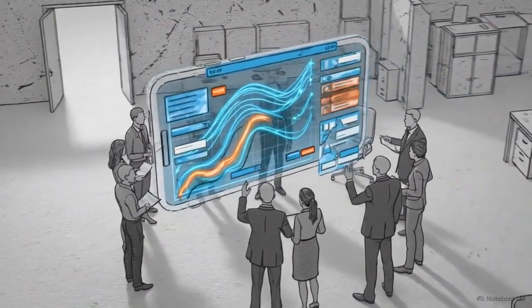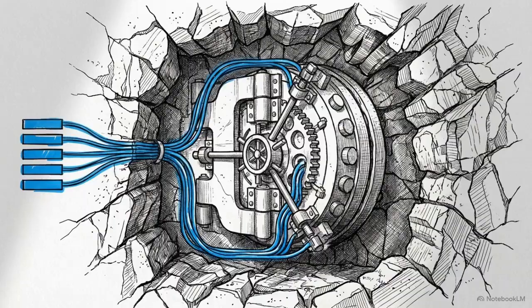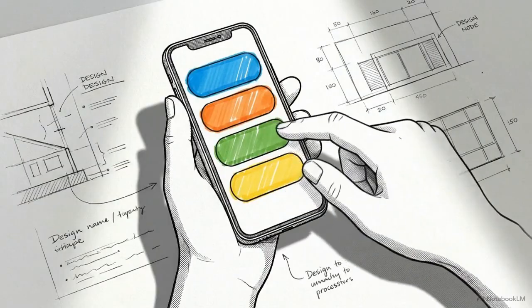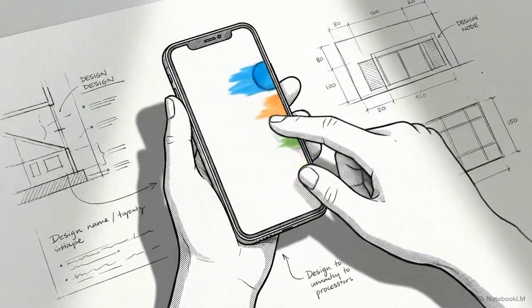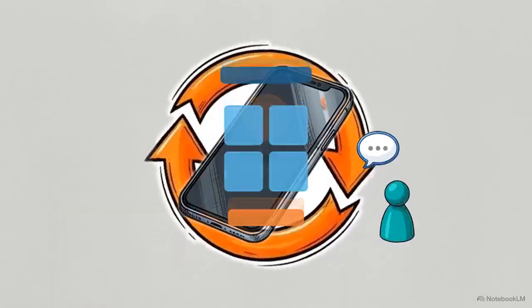Let's look at the development of a modern, large-scale consumer banking application. The hidden parts of the app that handle the actual money and the security required to follow strict banking laws, that part demands the strict, heavily documented predictability of the waterfall approach. However, the part of the app you actually see, the buttons and menus you swipe through, needs to feel modern and intuitive. Developers use Agile for that front-facing design so it can evolve rapidly alongside user preferences.